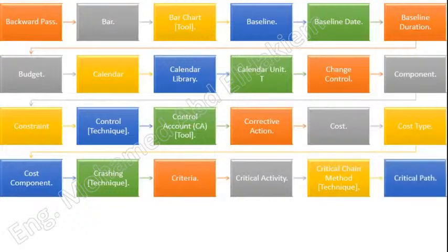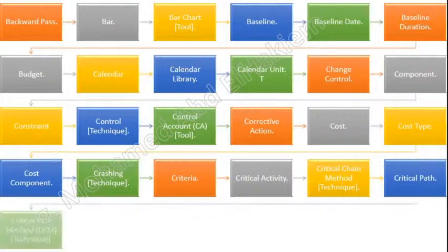Critical path. Generally, but not always, the sequence of schedule activities that determines the duration of the project. Generally, it is the longest path through the project. However, a critical path can end, as an example, on a schedule milestone that is in the middle of the project schedule and that finishes no later than an imposed date schedule constraint. See also project critical path, specified critical path, and critical path method.